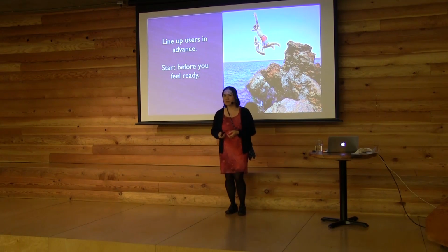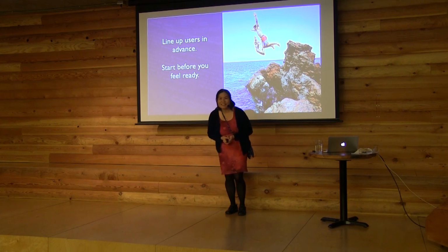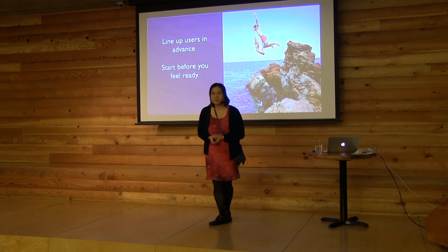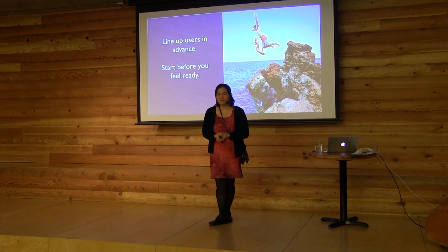Possibly. But I also find that doing that sort of test with the users and doing it well requires a lot of work up front. For instance, what assumption are we trying to validate through the test? How are we structuring the test so we get that assumption answered without throwing bias into it? There's all that type of work that needs to be done up front. By the time you're done, your development team is somewhere else and you have to have this merge happen to bring in that feedback.